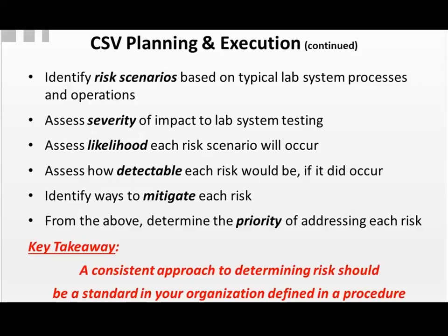You want to look at each one of those and determine the severity of the impact if it were to happen, the likelihood or probability of this scenario happening. You want to assess how detectable the risk would be. If it did occur, would you know it? And then identify any ways you have to mitigate each of those risks.